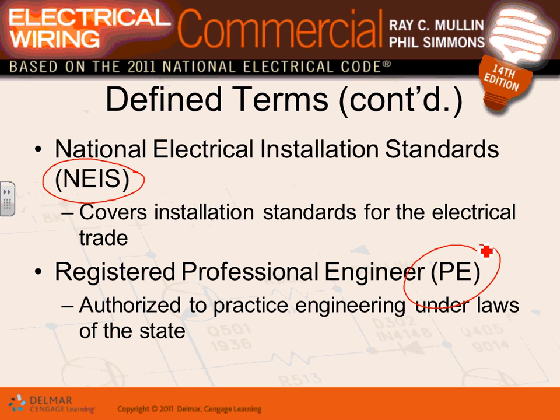And the last one is your friend Chad. Chad Kearney here. If all hell breaks loose, you pay me $1,000 and I can approve an equipment for you. Not me. They call them registered professional engineers. Every state, guys, has registration for engineers and has a list of engineers who can actually approve equipment. So, Derek, if you have a piece of equipment coming from Germany and it doesn't have your listing on it, and you need to install it for the airport, for example, because it's the only piece of equipment that works there, right? So what are you going to do? There's a list of engineers on the Department of Labor and Industry, literally a list of registered engineers in Minnesota, approved. I'm not one of them, but you can submit.